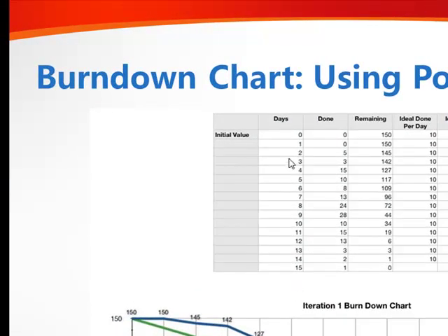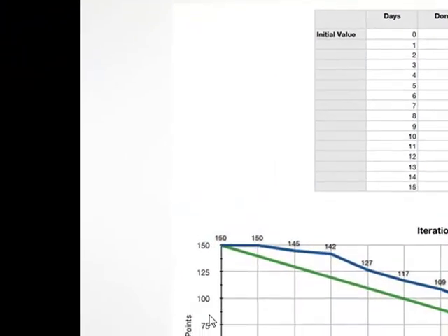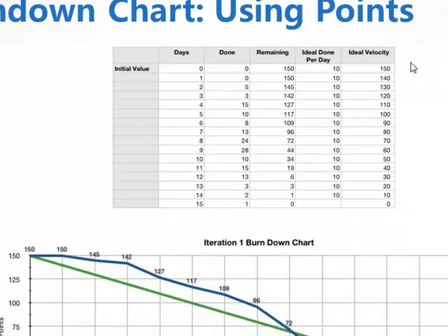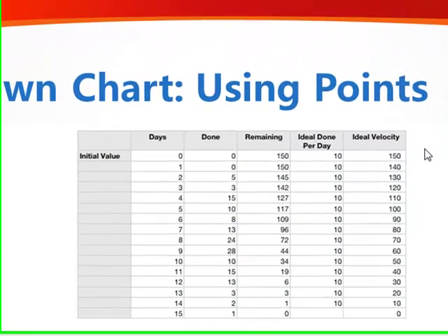In this sample, we have day 0, and again, the burn down chart. A burn down really isn't a burn down if it's not sloping downwards towards the right. So even if you are using points, the chart starts in the upper left. X-axis is still the time in days of the sprint, and the y-axis is your measurement. It was hours remaining, now it's points.